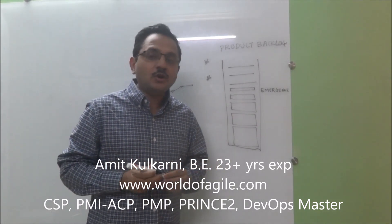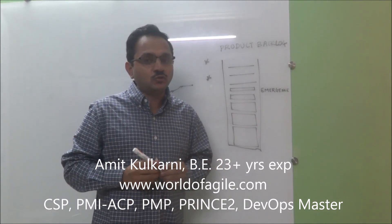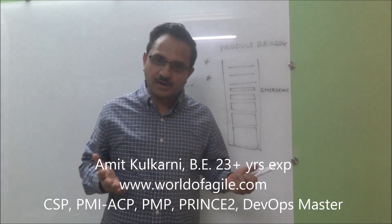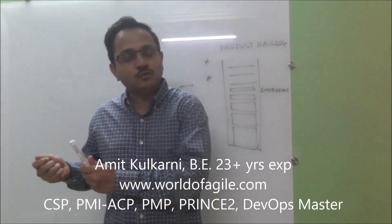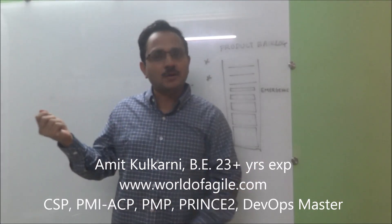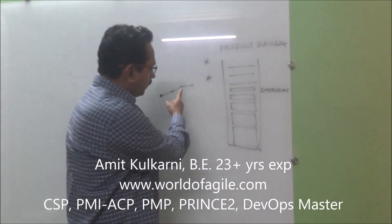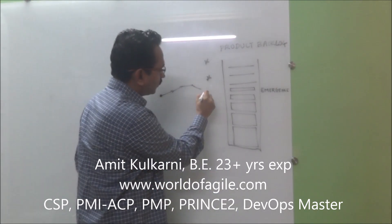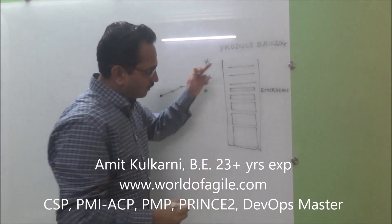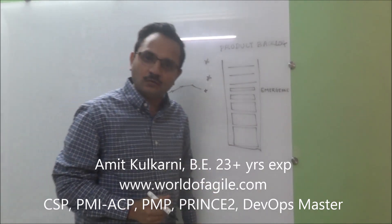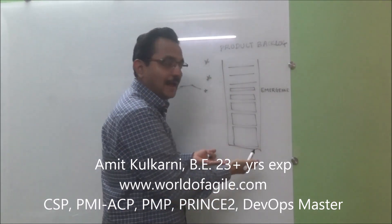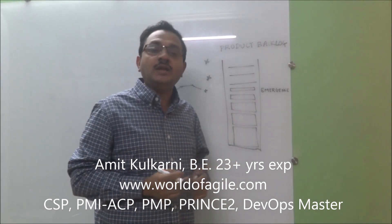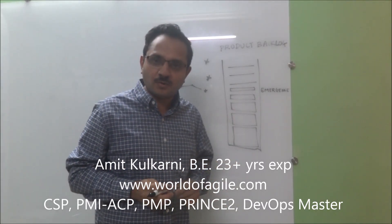In waterfall, we have been used to finalizing our entire scope upfront and then executing that scope to get our product ready. But when we want to go towards continuously changing scope, your Product Backlog also has to evolve — it has to emerge as you go along. This is called emergence of the Product Backlog.